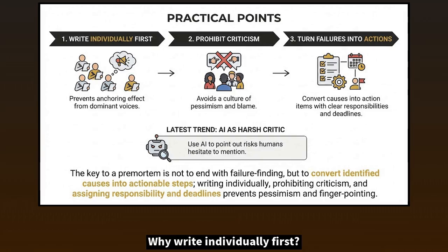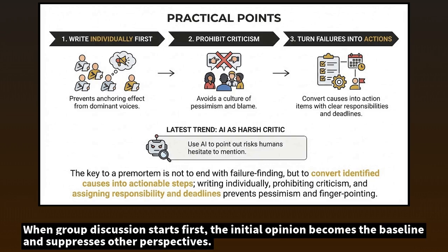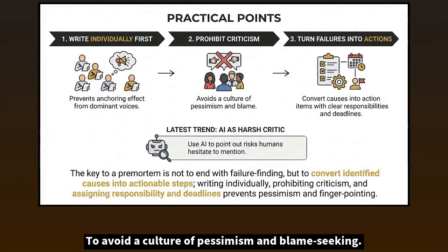Why write individually first? To prevent the anchoring effect of being swayed by the loudest voices. When group discussion starts first, the initial opinion becomes the baseline and suppresses other perspectives. Why prohibit criticism? To avoid a culture of pessimism and blame-seeking. Focus on what is the risk, not who is at fault.